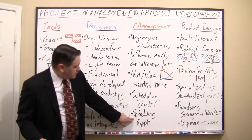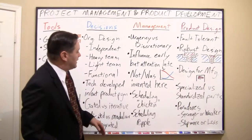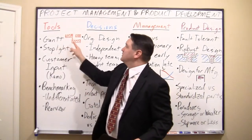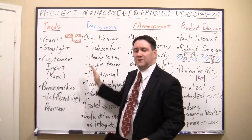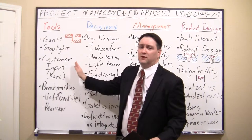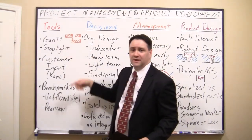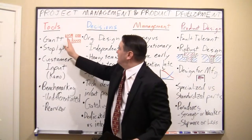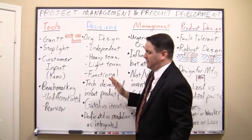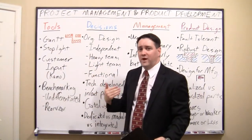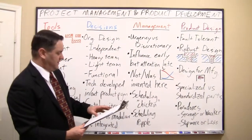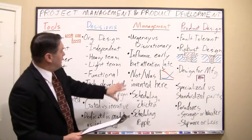The last management issue is what I call the scheduling ripple. Things start to slip, but nobody wants to admit the final deadline won't be met. Everyone thinks they'll fix it, so interim deadlines get compressed rather than the final deadline being moved — until it becomes a crisis. A Gantt chart helps illustrate when you're truly going to miss that deadline rather than letting the problem build silently.